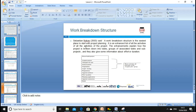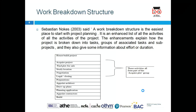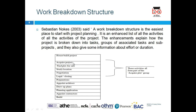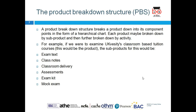According to Seppelstein, a Work Breakdown Structure (WBS) is the easiest place to start with project planning. It is an enhanced list of all the activities of the project, explaining how the project is broken down into tasks and groups of associated activities. It also gives information about the effort and duration. For example, if you want to build a house, the activities include: acquire land, find a plot, study the location, negotiation, legal and closing, preparation, appoint architect, draft the plan, planning application, appoint contractor, and build the house.